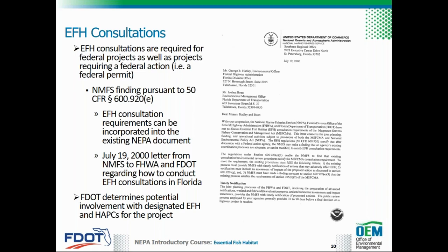Environment, or PD&E process. On July 19, 2000, NMFS sent a letter to Federal Highway Administration and FDOT regarding how to conduct EFH consultations in the state of Florida. The procedure documented in this letter was developed pursuant to 50 CFR, section 600.920(c). According to this letter, FDOT is responsible for determining potential involvement with designated EFH and HAPCs for a project.